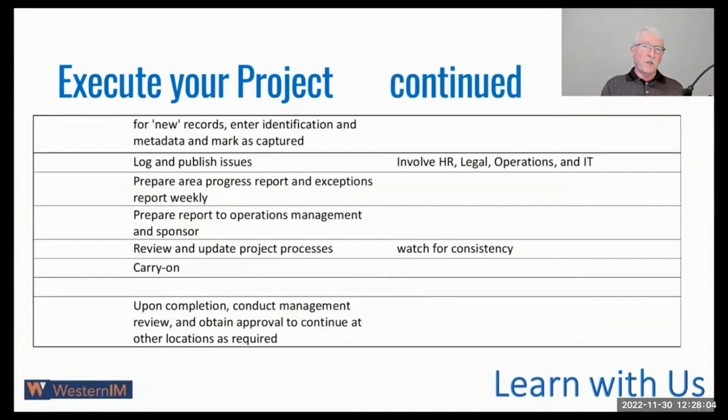And some of the finishing up things on the execution of the project. So new records, enter identification and metadata and mark as captured. Now we've said that quite a few times, but it's a pretty important concept, that whole idea of marking as captured. Log and publish any issues that have occurred along the way. Prepare the area progress report and exceptions report weekly. So make sure you keep on top of that and get it done on a weekly basis.